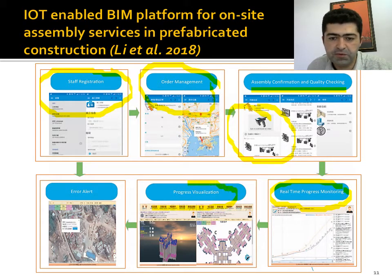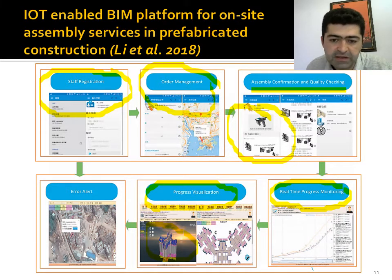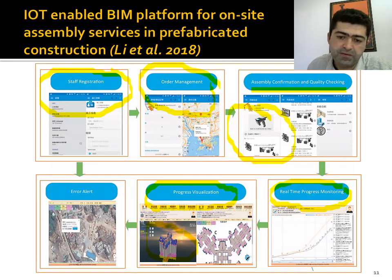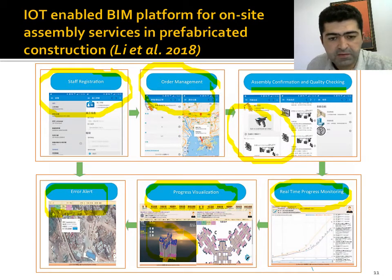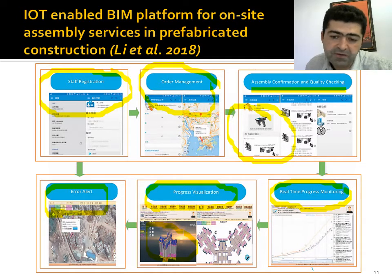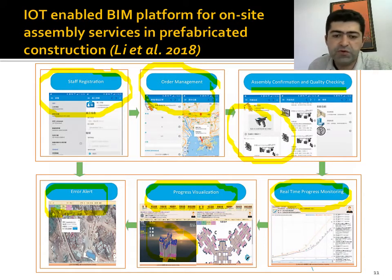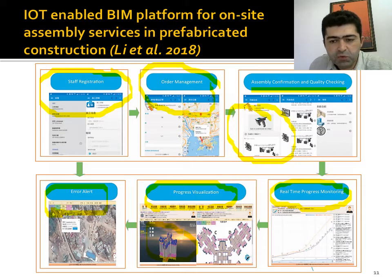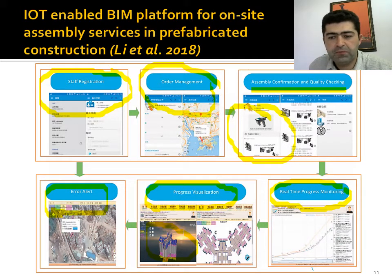In the progress visualization module, they implemented a BIM model integrated with the system to see the positions of the assembly products. In the error alert module, the system allows users to see whether an assembly product is in the right position using GPS coordinates. If there are any misalignments or errors, the system raises alerts to inform users. The overall system integrates the whole assembly flow and process in one technological implementation.